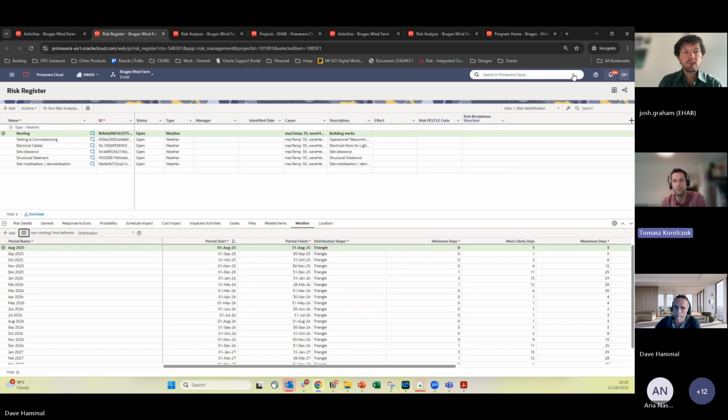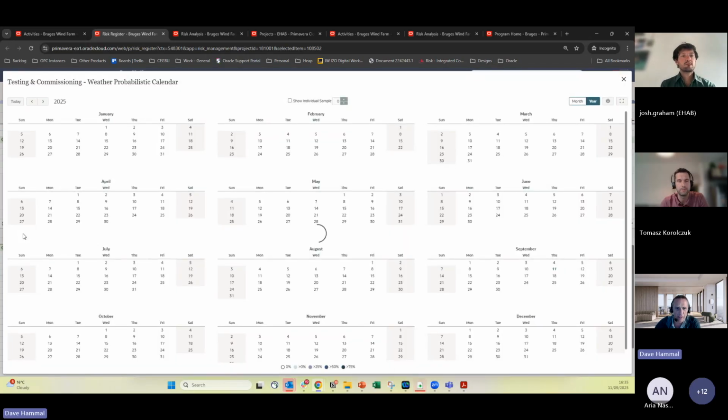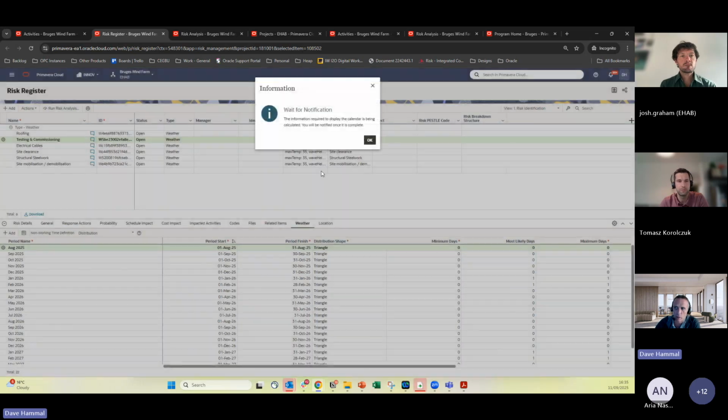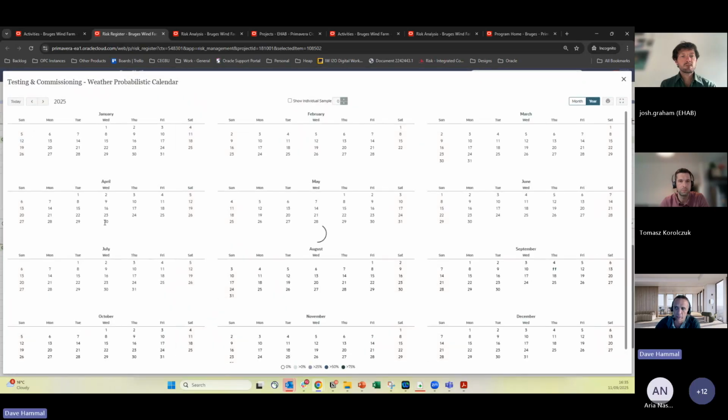And what you were showing before was basically an average, like a heat map from all iterations. Exactly. I think we just run 100 in that first little calendar generation. It's not the full 1,000 or 5,000 or anything. It's just giving you a quick feel for what that looks like. But yeah, it's running a mini Monte Carlo simulation. It's showing you, first of all, the average.